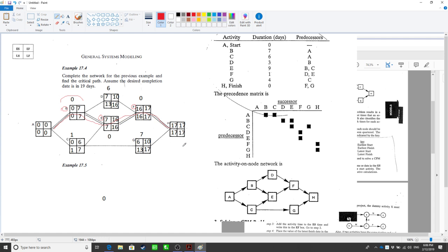First, put something in the start node. We go forward. We find the enabled nodes. We go forward all the way to the end. Then start from the end point. Go all the way back. Then we calculate the slack time and select those slack times that equal the LS minus ES of the start. Then we can find out the critical path, and that's also the longest path. All right. Okay. So that's the main thing I want to talk about today.